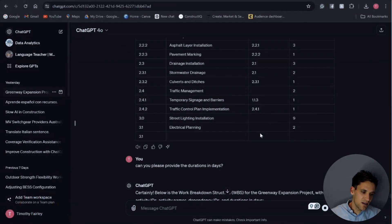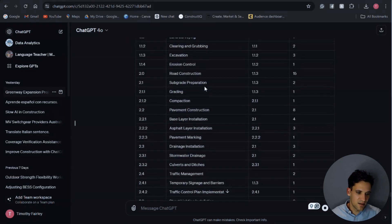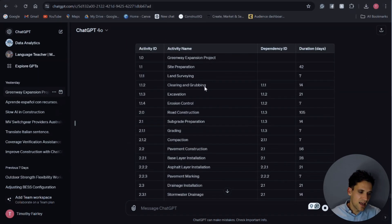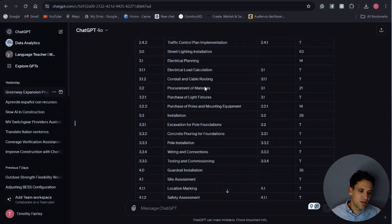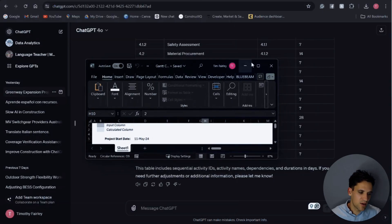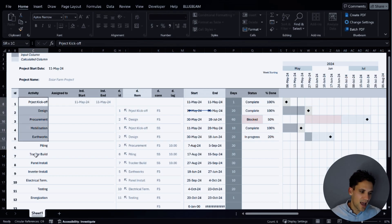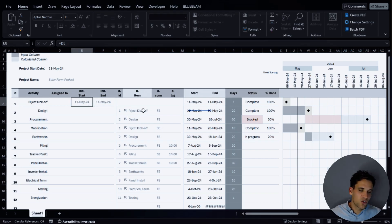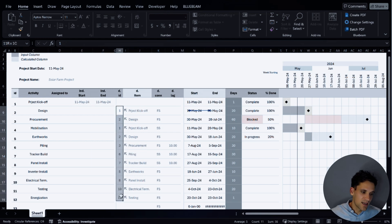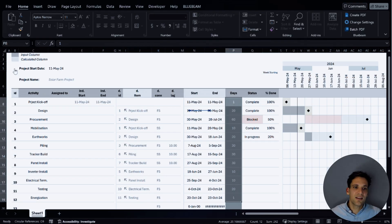Here I've got the data from my schedule model — it's given me the activities, the activity names, start dates, dependencies, and durations of all the activities. I've told it to give the data in the format I'll copy into my table. I've made sure the format matches the Gantt chart I'm using — just a simple Excel Gantt chart — so I can simply extract the data from ChatGPT and copy it in, rather than having to do additional data processing.